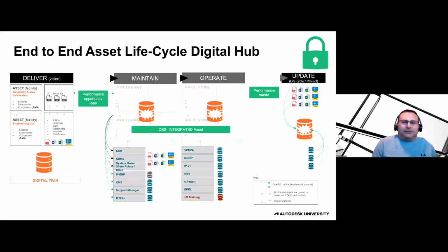Yeah, okay. The first thing takes place in the first step of the life cycle, the delivery phase, from design to construction. We as GSK need to own the data and set up our organization for this ownership right from the beginning. The ownership will start with setting up what we call the Common Data Environment platform, or CDE, which will aggregate in one place the geometry, what we call the 3D model, and the engineering documentation coming from the whole supply chain: equipment suppliers, system integrators, engineering partners, etc.